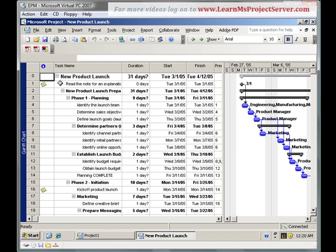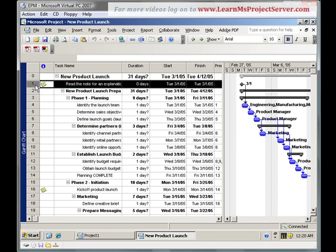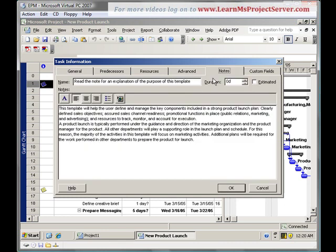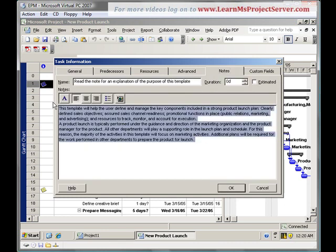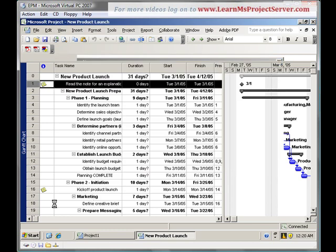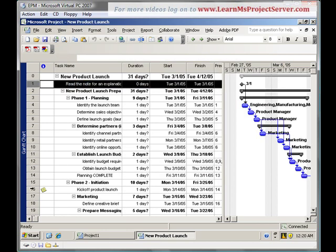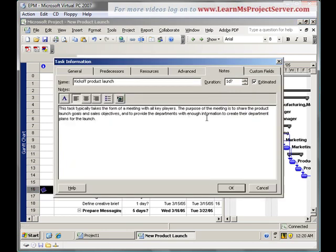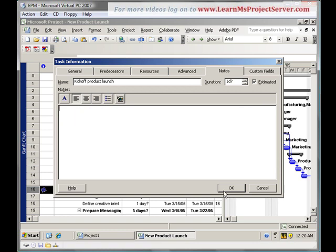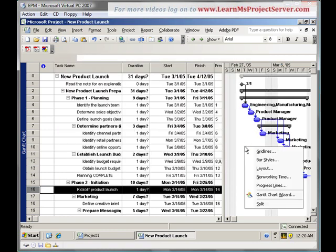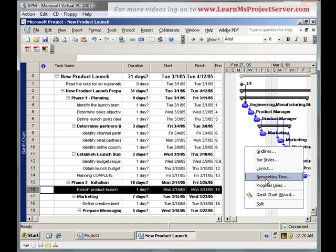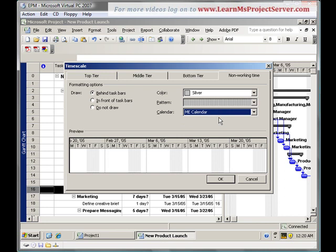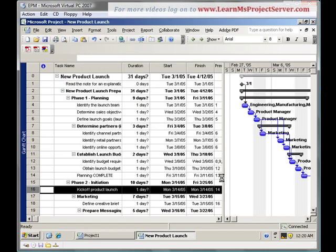Some of the customizations that we want to have is that we'll take off these notes. We double click this and hit the notes. Clear off these notes. We'll clear the notes on these two tasks. Let's go to the working time. I want to use a Middle Eastern calendar. That's a different calendar that we have set for the Middle East where we have the weekend as Thursday and Friday. I hit OK.